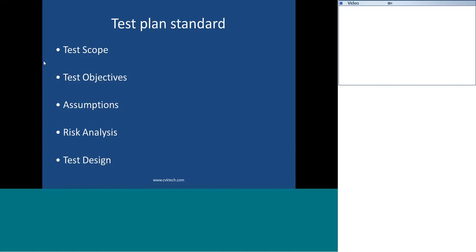What we were talking about was the timeline. When we have a lesser timeline, we may end up having less coverage of testing. So it depends on the dialogue we have with the customer. We can say that we will cover only 80% of our requirements. If you are good with 80% of requirements and ready to accept 20% of risk, then we will deliver this product. If the customer is not ready, then we should have a backup plan like adding resources to our pool or adding resources to the testing team and try to finish all the 100% requirements for testing.